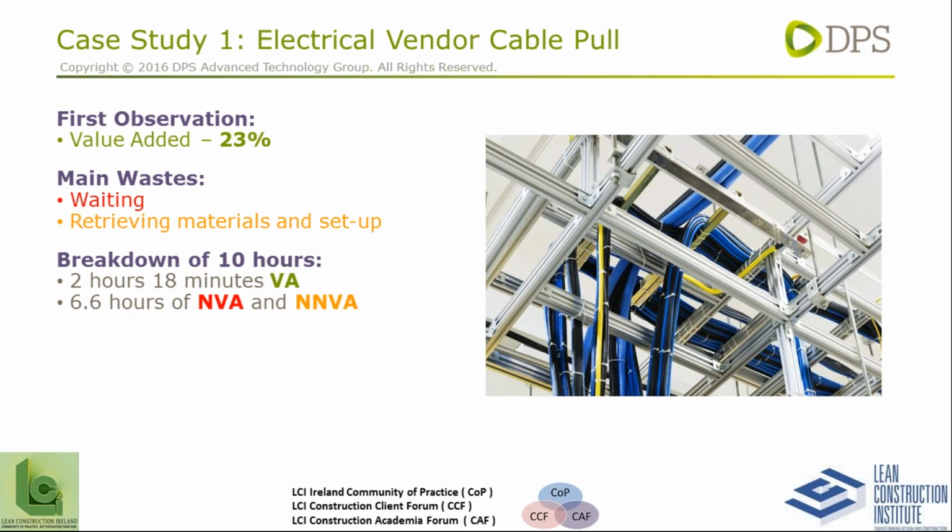Retrieving materials and setup: the guys having to select from up to 20 cables on the floor, which didn't have a whole lot of visual management. They were deciding which is the right cable, what is the sequence of the pulls, all that sort of stuff. So retrieving materials and setup was quite substantial.